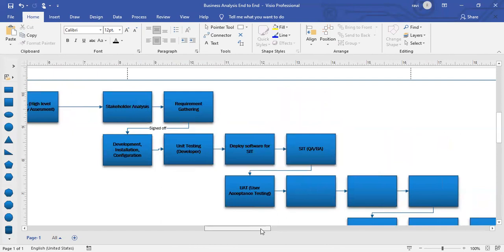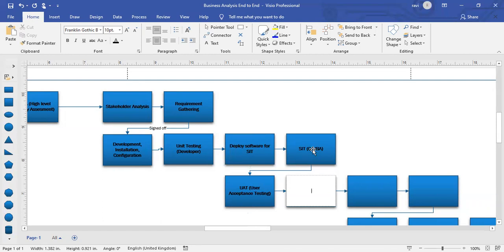Once we do the user acceptance testing, normally there will be one or two users nominated from the business side. They will be doing the testing. And then finally we consolidate the UAT results and the SIT results, and then we demo the test results, or do a walkthrough.